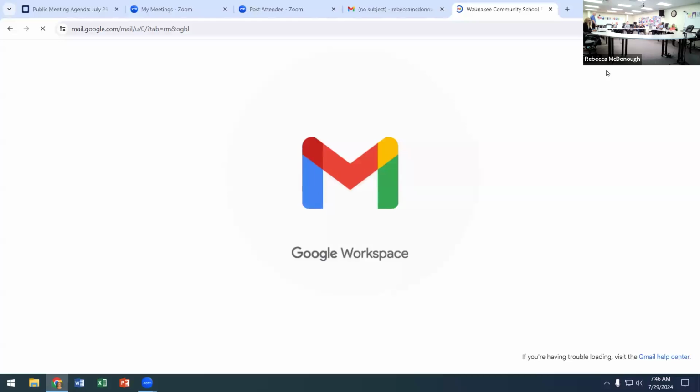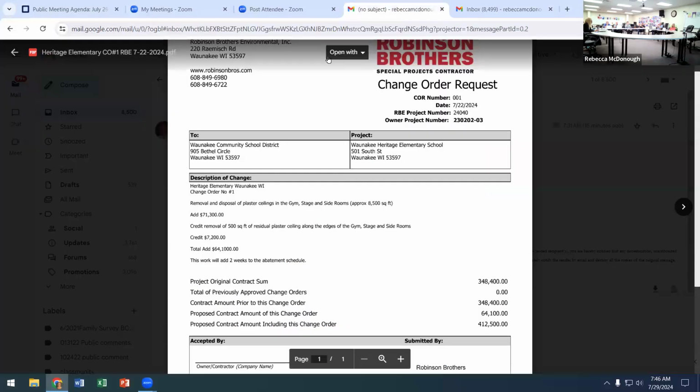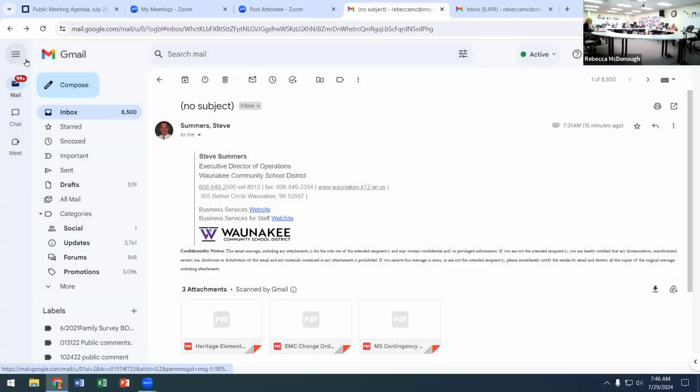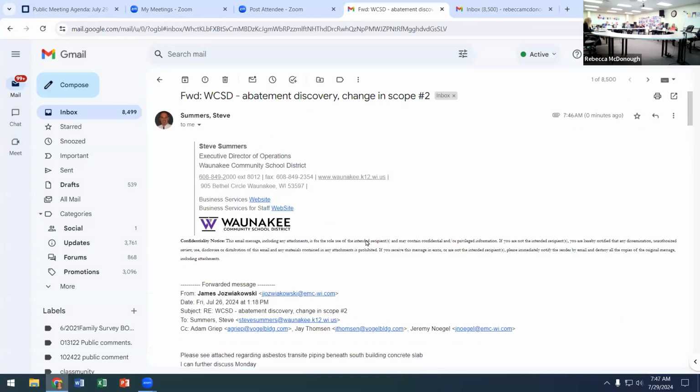So you don't know the cost of that because you don't know. I have Robinson out there. We did our best guess to estimate how many there would be. We had a time and material estimate of not to exceed $12,000. Hoping that's generous, but it just depends on how many runs of those we have.